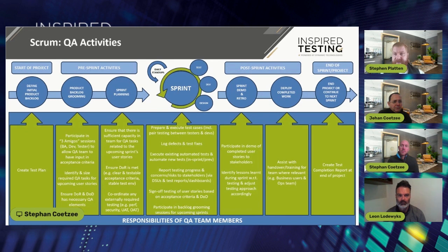So I think it also depends on how deep and wide that coverage of those 70 gives you, and then what risk, and then it's balancing that coverage versus the amount of risk the business is willing to accept for that coverage. So that's what I coined with a client a couple of weeks ago as minimal viable tests, which was a critical mass of, in this case, a mix of automation and manual tests and scenarios. It's a critical mass of, I think that's enough. That should give you enough evidence for you to make a decision on.